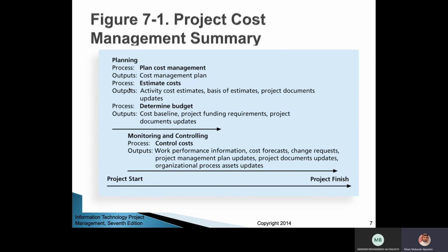If there are any deviations from the plan, the baseline of the project, especially the cost baseline, any deviations, you need to correct them. And these corrections are changes. Changes need to go through the procedure of change requests. So you issue a change request, and then it goes through the procedure to review this change. Before doing the change, you need to review it. Someone will need to review it.